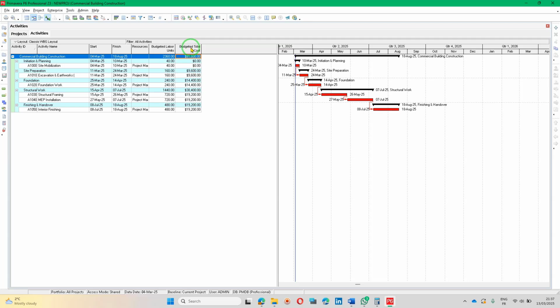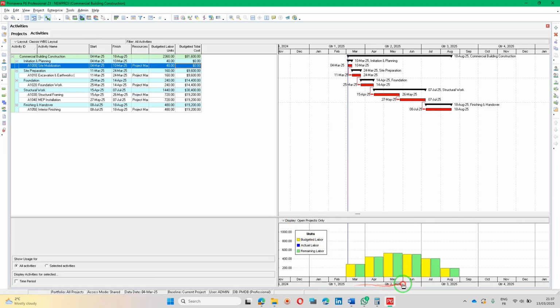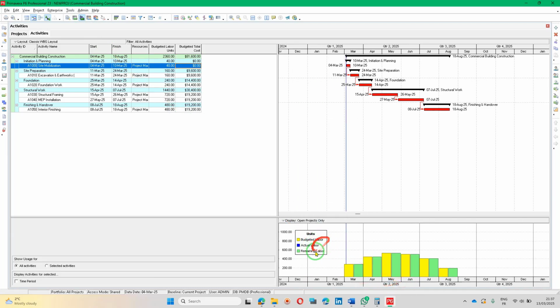It's important to remember that this recalculation is only required if you change the resource cost after the assignment. Now we have the labor units, we have the total cost, we are ready to do the baseline.